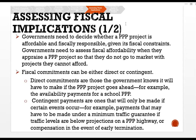Governments need to decide whether a PPP project is affordable and fiscally responsible given fiscal constraints. Governments need to assess fiscal affordability before they go to market with procurement. Fiscal commitments can be either direct or contingent. Direct commitments are those the government knows it will have to make if the PPP goes ahead — for example, availability payments for a school PPP. Contingent payments are those that will only be made if certain events occur — for example, payments that may have to be made under a minimum traffic guarantee if traffic levels are below projections, or compensation in the event of any termination.